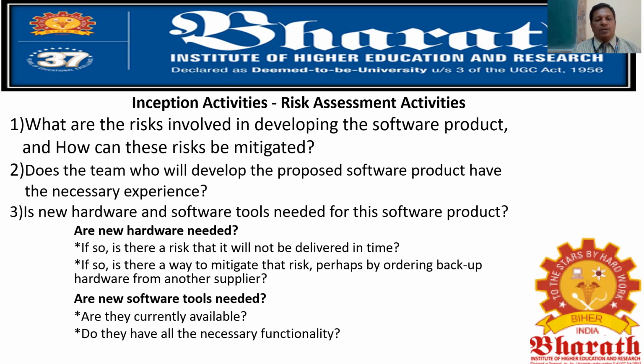Whether new hardware and software tools are needed for this product is another important risk factor. Whether you need to find new hardware. You might already have purchased some hardware for the organization, so for developing one particular application, whether you need to buy new hardware. And whether the particular supplier will supply the hardware in time. Is there any risk if the product is not delivered in time? These are some factors, the risk factors, you need to identify.